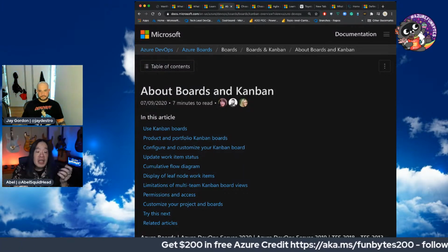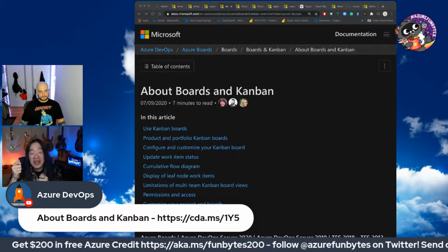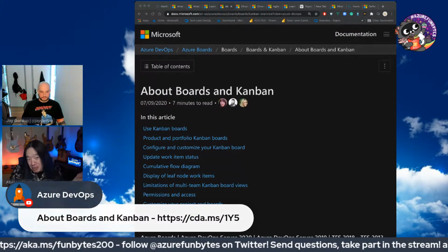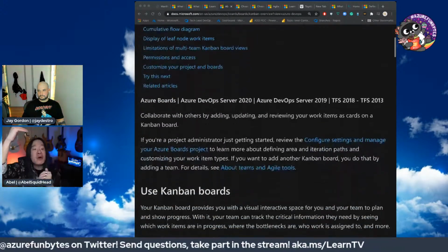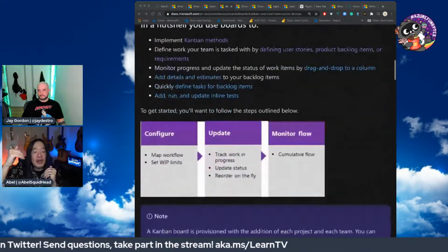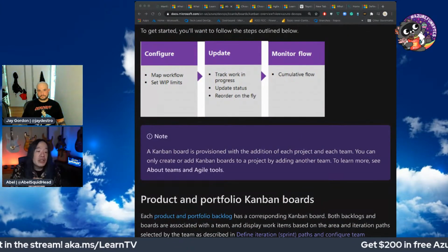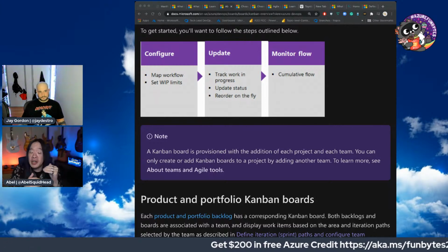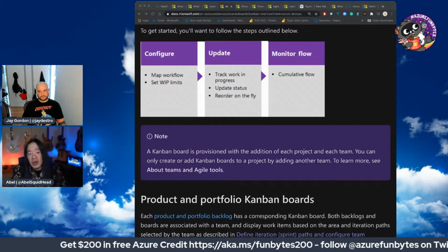And oftentimes, you don't even need to prioritize the entire backlog. You just need to prioritize enough for at least 1.5 sprints maybe. And that's pretty much good enough. You just need to say these 10 items are the most important things that I think the software needs to have, because clearly within one sprint, we can't finish 10 items. So yeah, that's going to be plenty, right? So you don't need to prioritize the entire thing, but you do need to prioritize enough so that it's one sprint's worth and maybe a little bit more.